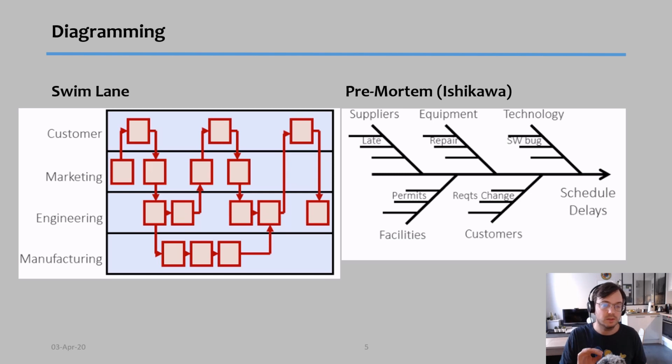This is an important one to understand because every arrow you see is a possible risk of communication. And every time an arrow crosses a swimming lane, the risk is aggravated. For example, over here we have an arrow that stays within the same lane, so the risk here is much lower than, for example, this one over here that crosses different lanes.